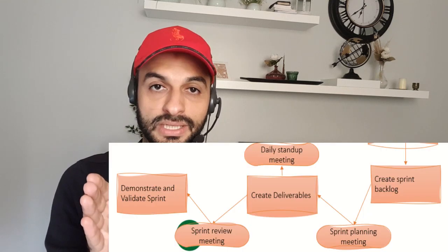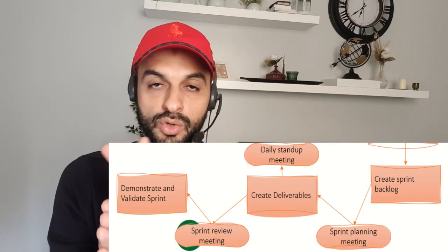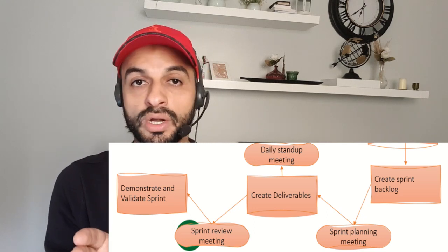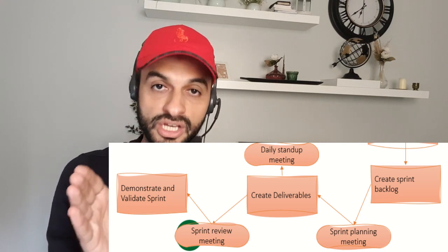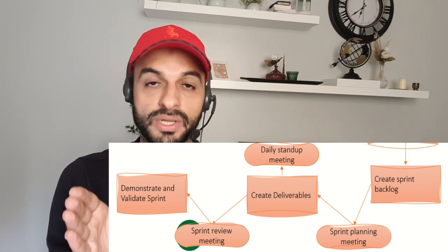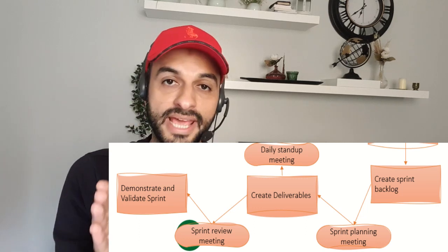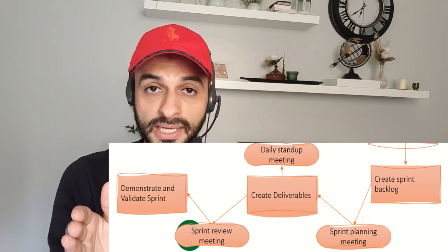Normally, when you have one sprint, you do it like that. Before starting the sprint, you make something called a sprint planning meeting. So you explain to the team what we shall do, what is the content of the work in this sprint. After you finish the sprint, you make a sprint review meeting with your team to make sure that the work is done as you have planned in the beginning.